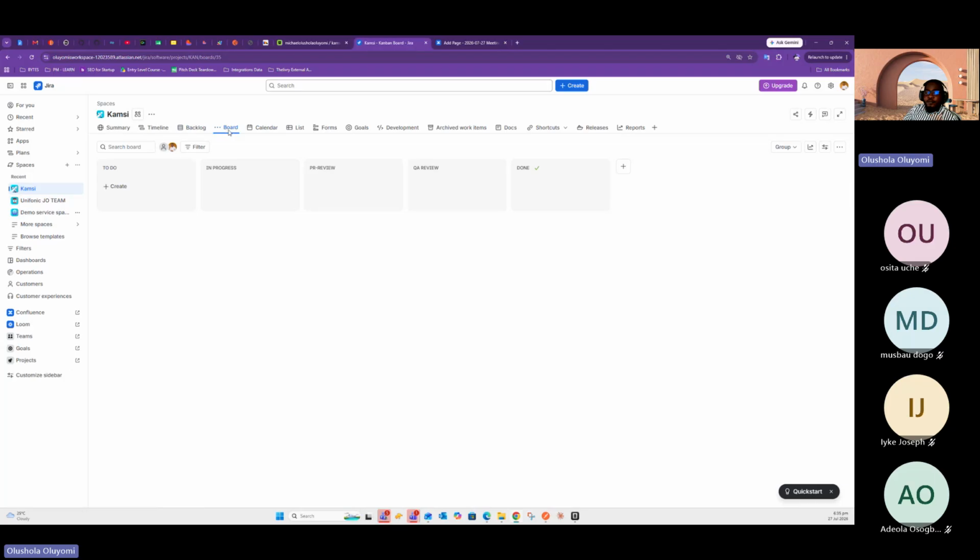All right, so we have something called a sprint board. When you start a sprint, all your tasks are visible on a board, and you can see how these things are moving. I advise all the PMs that work under me or that I mentor to keep their statuses, which you call stages, as short as possible if you can help it. But if your team is more complex, where you don't just have a QA, you have a software developer in test, which means you have automation, you can add another layer here.